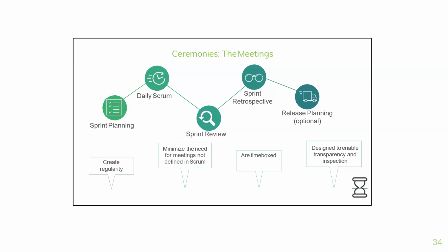Then the sprint review is what we've done before we release it to the general public. The people that have asked us to do it, we do a small demo for them. They take a look at it and they say, okay, this is good, we'll release that to the users. The sprint retrospective is usually for just the engineers, the engineering team, without the Scrum Master, without the product owner. And then they're asking, okay, what did we do wrong? Can we get better?